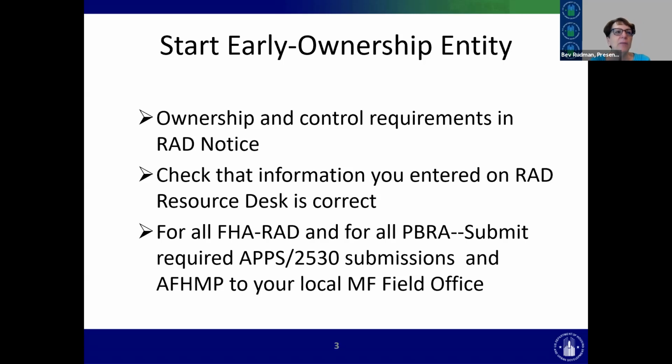The last thing I want to say about ownership entity is that for PBRA and for PBV that has any PBVs with FHA insurance, you are going to have to go to the multifamily field office and submit your applications, submit the required, I guess it's called the APPS system. I don't even know what that stands for. It used to be called 2530, and I think everyone still refers to it that way. The 2530 submissions for ownership, the review of the owners,